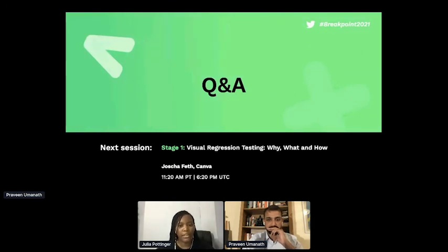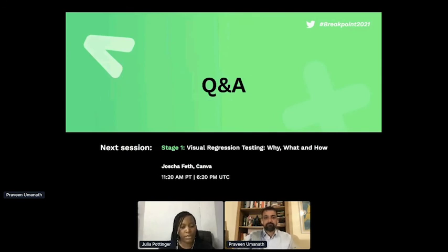So if you ensure that there's a proper transition period, as well as proper transition goals, I found that to be really important, and ensure that the knowledge and skills match. So if the developer was using JavaScript, for example, the person that is going to replace that should also know JavaScript so that there can be a smoother transition. If you're going to take someone that has no object-oriented programming language, then you're going to need to give them time to train and become ramped up. So overall, I found that having a transition period helps to smooth that out.